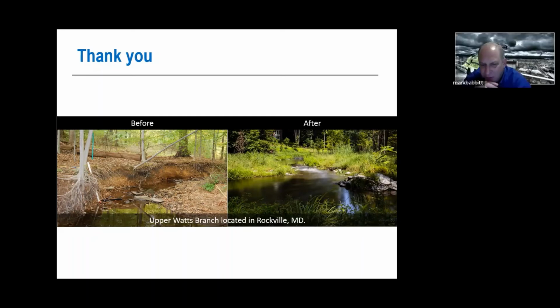Can I step in here? And Nick, of course, I'd like you to listen to what I'm saying and join in. The Park Service requires us to put back inch by inch of tree removal. Now, can we replace a tree that's been growing for years? No, but for the 200 or so trees we're going to take down, we're going to be replacing, I don't know, 1,500, 2,000 plus, paying in to the conservancy for Nick to have additional planting. So will it immediately replace the trees? No. But in the long run, we are putting back equal diameter of trees, which are more trees. And will it facilitate immediately? No. But in the long run, the park will be better off.